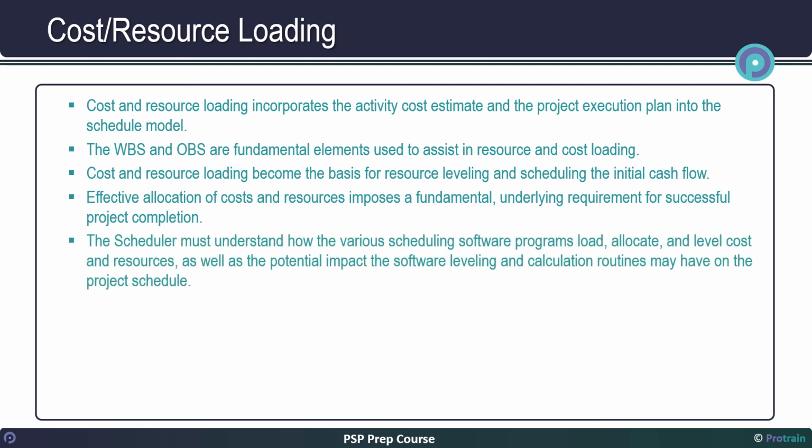The scheduler must understand how the various scheduling software programs load, allocate, and level cost and resources, as well as the potential impact the software leveling and calculation routines may have on the project schedule.